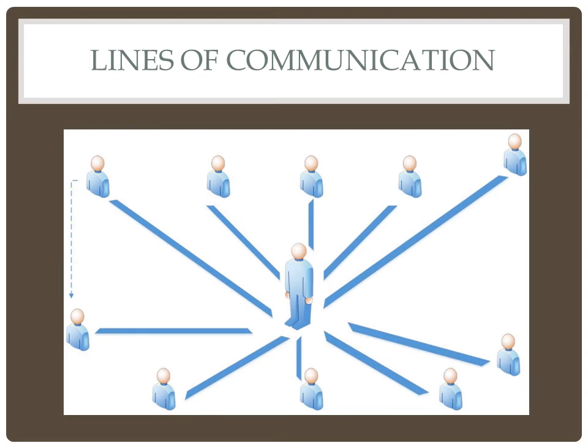It's helpful to establish some guidelines for communication on a project, especially the large or complex ones. Ideally, all communication would flow through the project manager to ensure appropriate stakeholders are kept in the loop for their areas of responsibility. That may or may not be realistic for every project. The goal is to make sure decisions are not made in a silo that could potentially have an adverse impact on another area, the schedule, or even the budget.